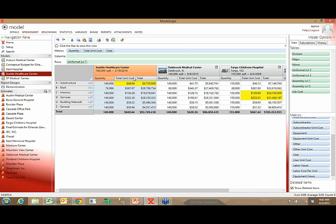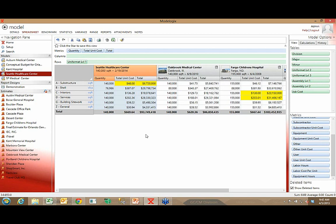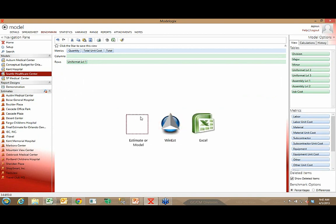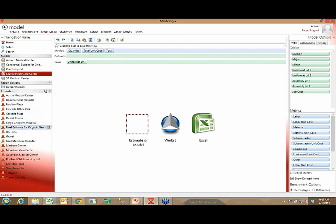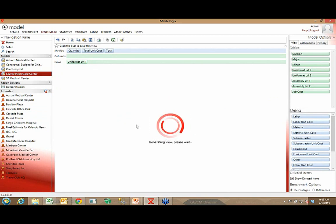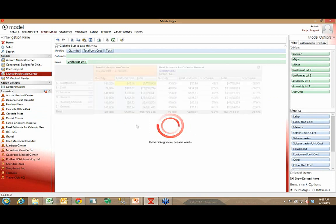So let's say that this Seattle Healthcare is my model. But let's say I've got a final estimate here for my Seattle project. I've got a final estimate. I want to benchmark it against the model. I can do that very quickly. I can click on the Benchmark tab. And you'll notice I see a box here. This would allow me to point to the project that I want to benchmark against the model. So I'm going to grab this project, drag it over the box, and just release it. And now when I come over here, I can walk down this Benchmark column and I can analyze my final estimate against the model and look for variances that are beyond a reasonable difference.